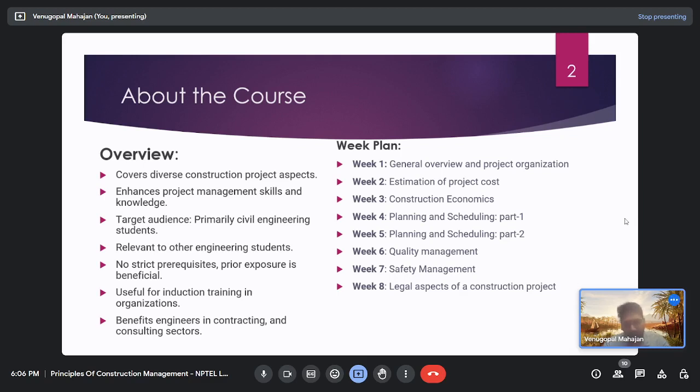Regarding the duration of activities, we already did something like that in estimation of project cost, if you remember, that we had quantum of work and then we had productivity rates. From that we found out the durations, and from duration we went into calculation of cost and all, right?